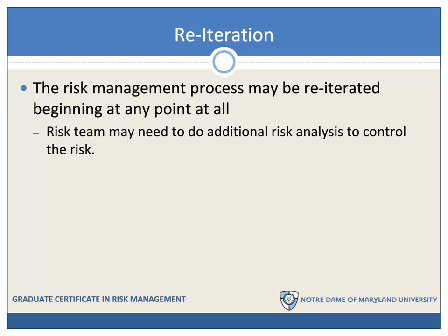If the evaluation shows the risk management objectives are being met or adequate progress toward them is being made, there is no need to modify the risk management option you have chosen. If evaluation suggests that adequate progress has not been made, risk managers may decide to repeat some or all of the risk management process. Additional risk analysis may be required to control the risk. This self-check is a vitally important part of any serious attempt to make good decisions under uncertainty.